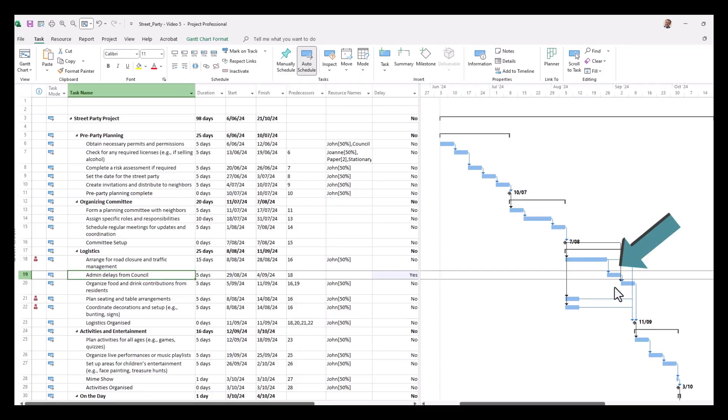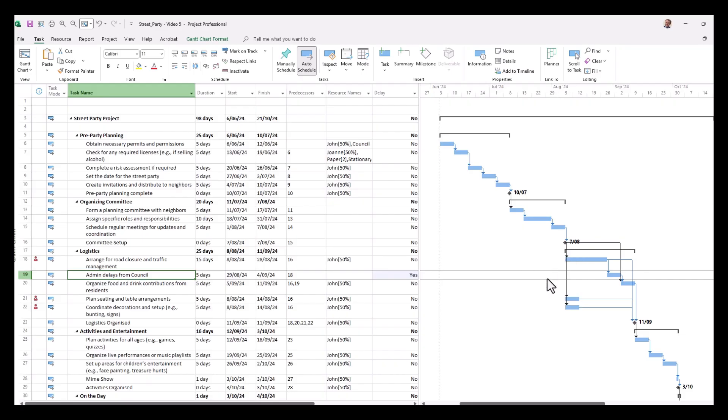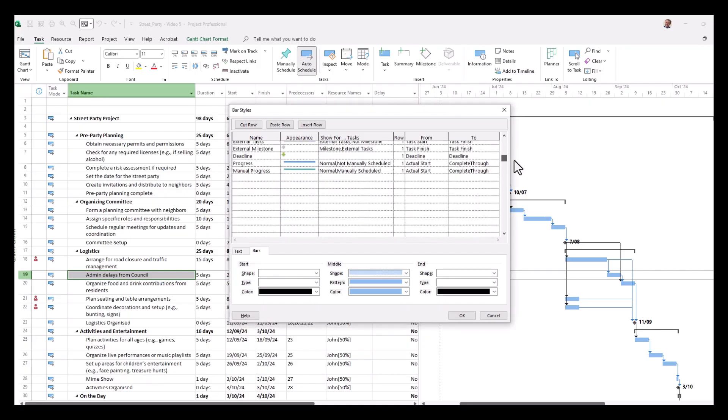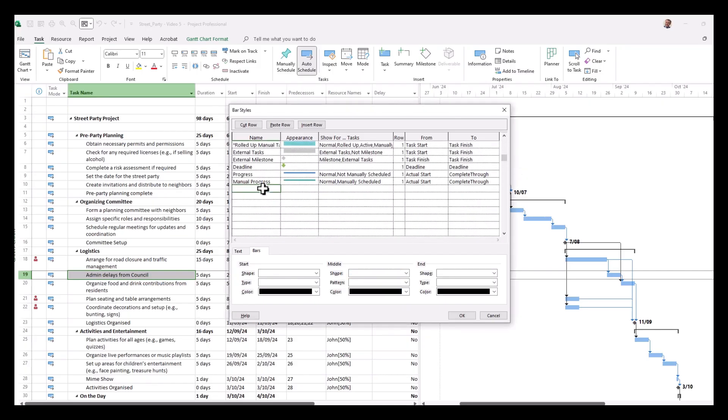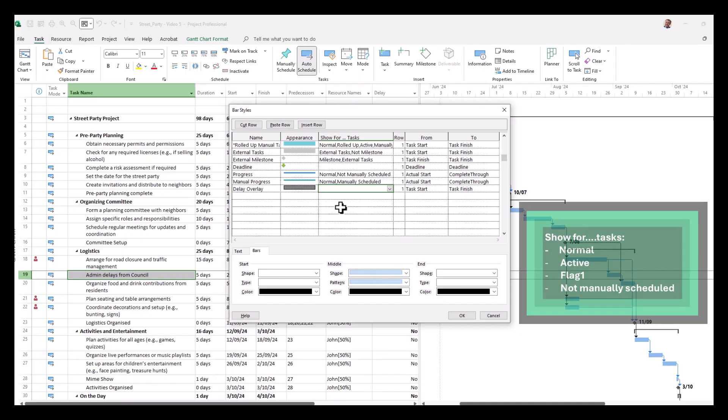Now it would be good if we can make this task stand out on the bar charts. We can do that through bar styles. So we right click on our Gantt chart and we click bar styles. What we'll do is actually go to the bottom of this sheet and insert our new details here. So we'll call this special bar delay overlay. It's a default appearance. Now we're going to have this as normal, active, flag one, and not manually scheduled. So I'll add those criteria to the show for tasks column.